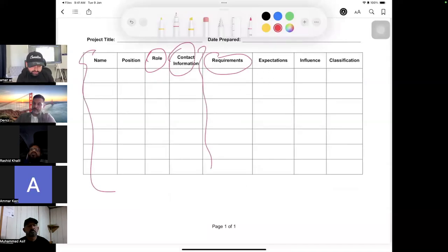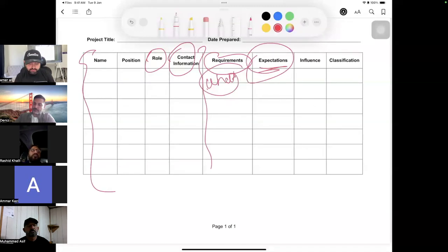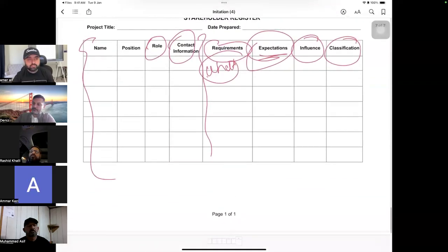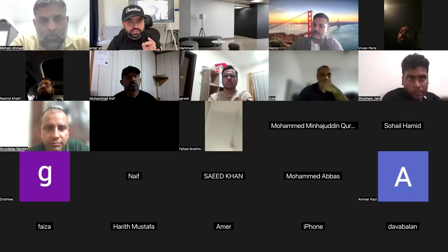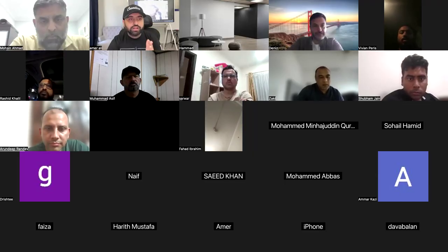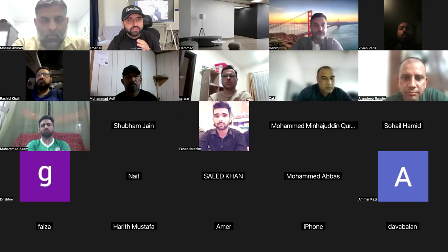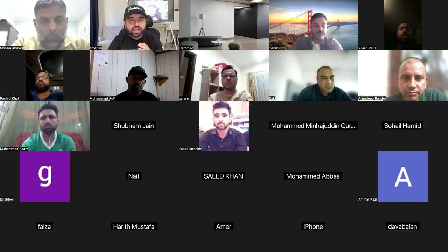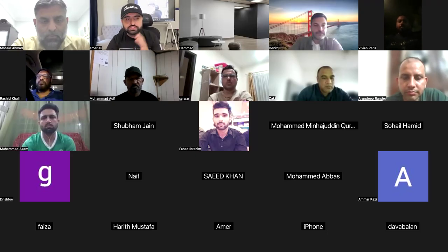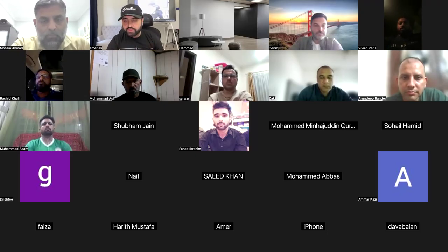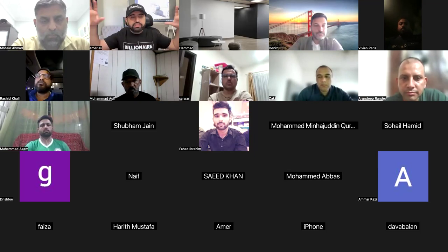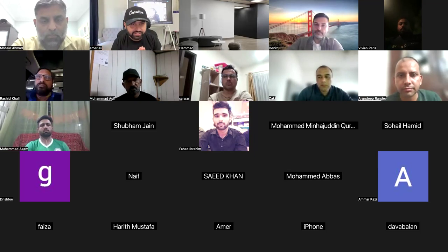But here comes the interesting thing. What does he need? Maybe expectations. His power, interest. Where do you put him? Kind of important. The stakeholder register is very critical for the project. Every project has its own stakeholder register and it must be updated throughout the project. It must be looked into, and we need to see how we can engage all the stakeholders in our projects. Okay, now comes the most comprehensive part of the PMP, planning.